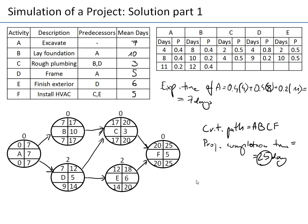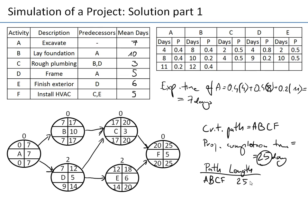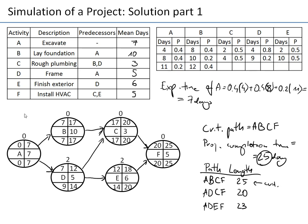Before simulation, it's useful to identify all paths in this network. There are three paths: A→B→C→F with length 25 days; A→D→C→F with length 7+5+3+5 = 20 days (not critical); and A→D→E→F with length 7+5+6+5 = 23 days. The first path is critical as we already saw.